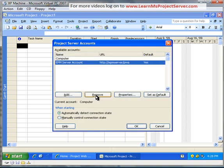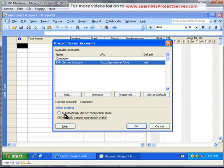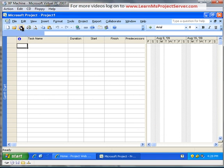And the next option you set up is when starting, do you want the Project Professional to automatically detect the connection state and choose the best profile, or you want to manually select the connection state? You want the Project Professional to look into the connectivity, and if it sees a connection to the Project Server that you have configured, go ahead and run in the connected mode. And for some reason, if you're not connected to the Project Server, go ahead and work in the offline mode. The only visible identification on the screen is that you'll have a small icon saying it's connected in the status bar. It's a matter of preference, and I prefer to keep it on the manually controlled connection state. So I can select either I want to work with the connected state, or I want to work in the offline state. Even if my computer is connected, I do not want to work on the connected state. This would give me more control on how I want the Project Professional to work. So I leave it to manually controlled connection state, and hit close.